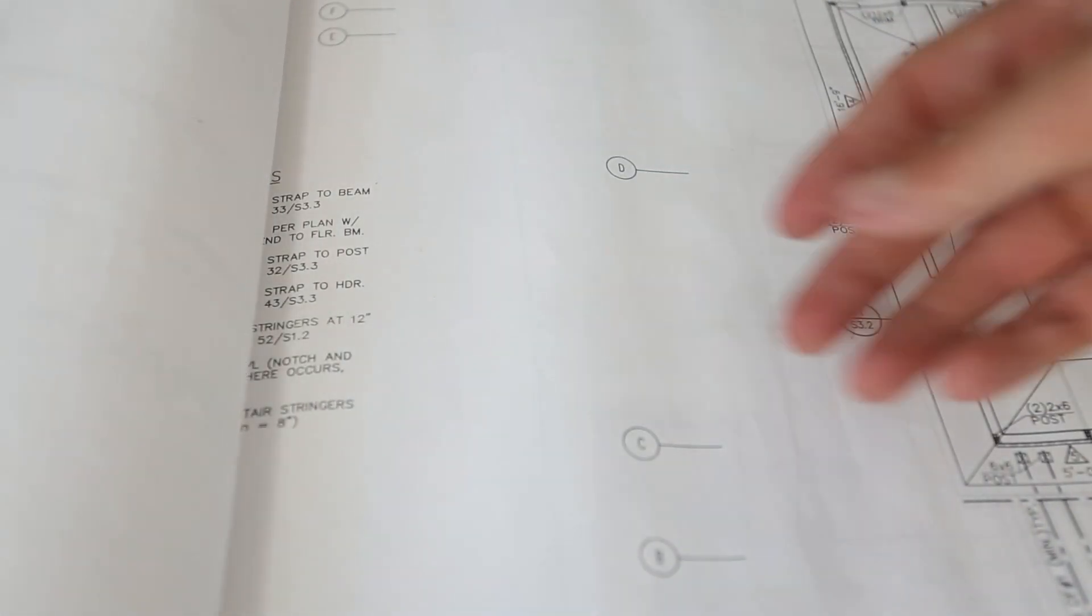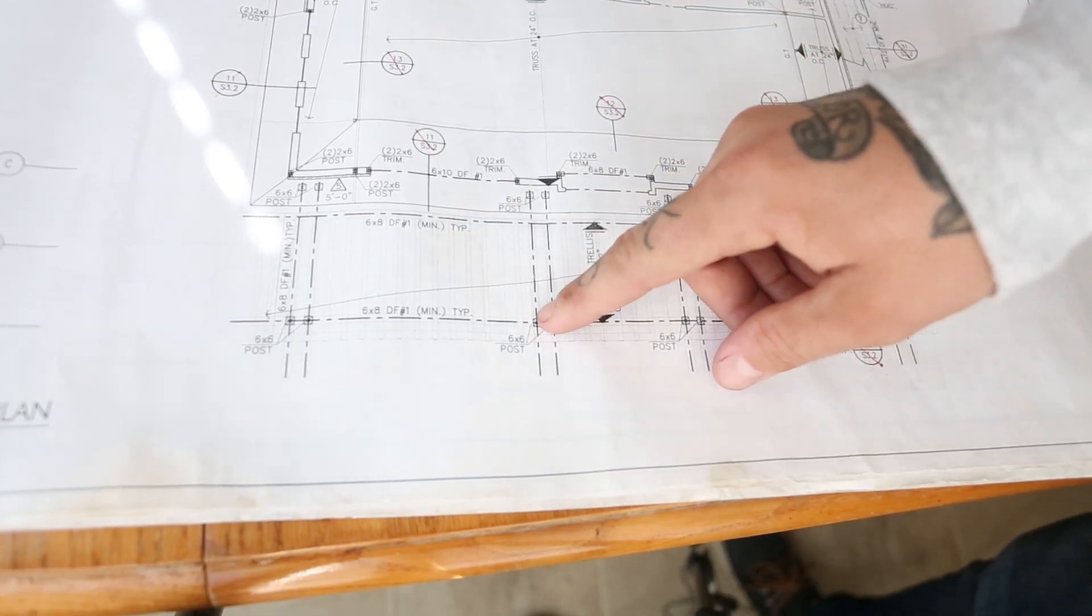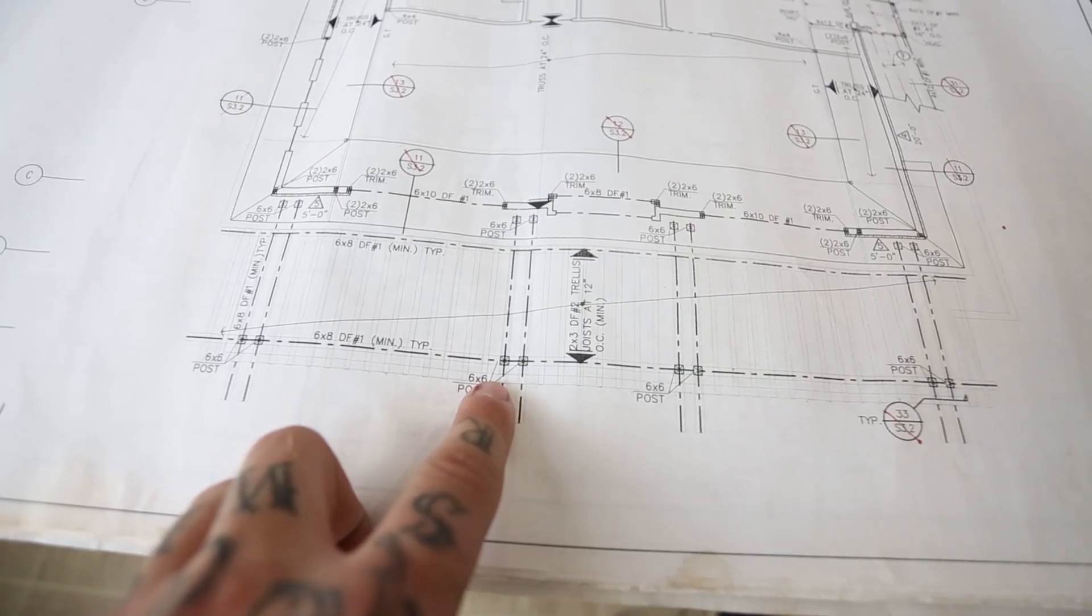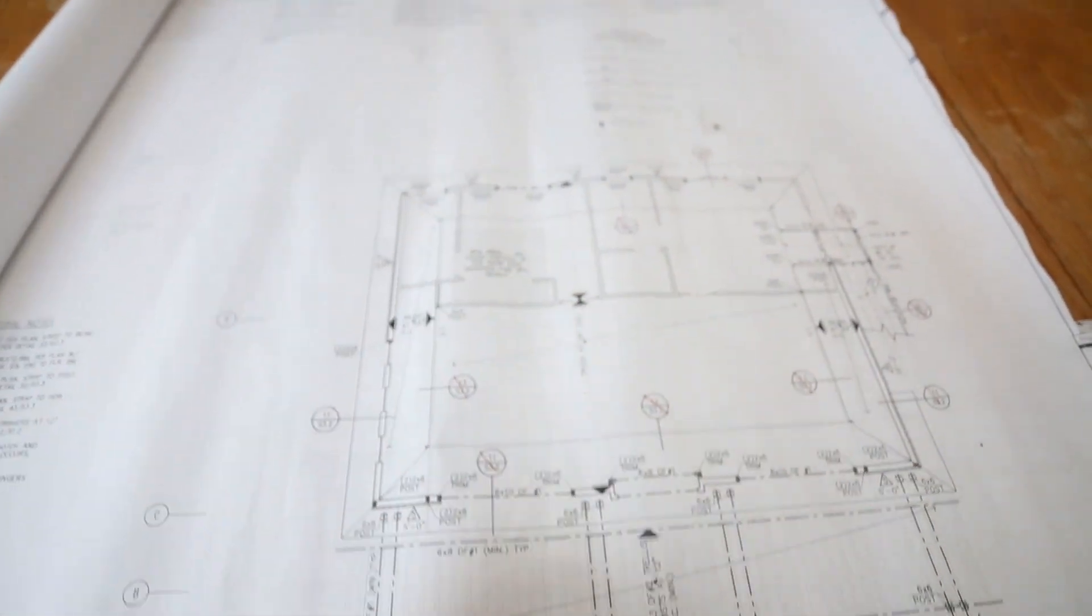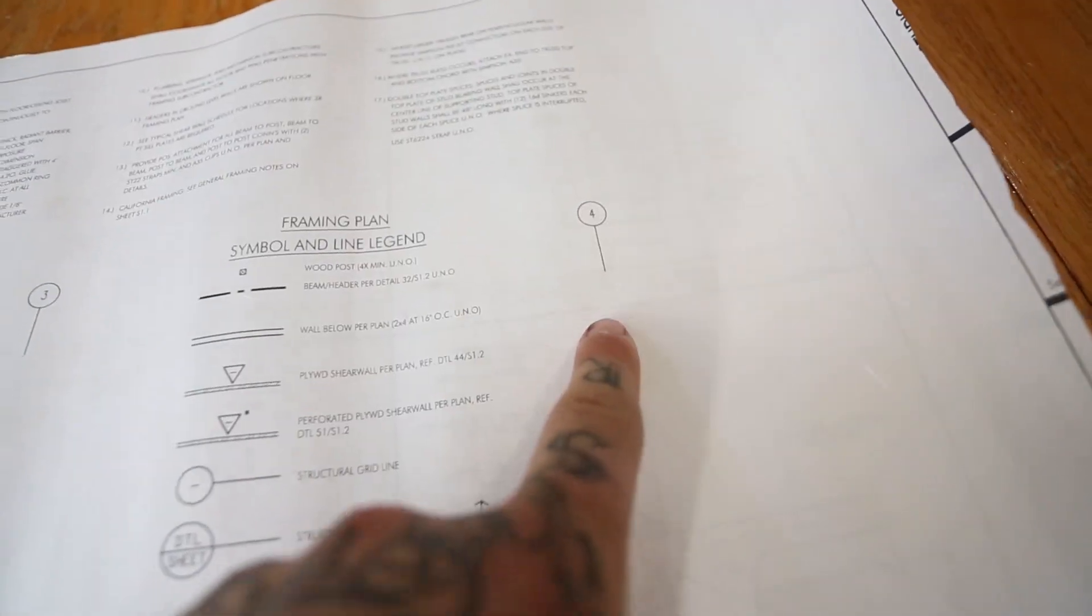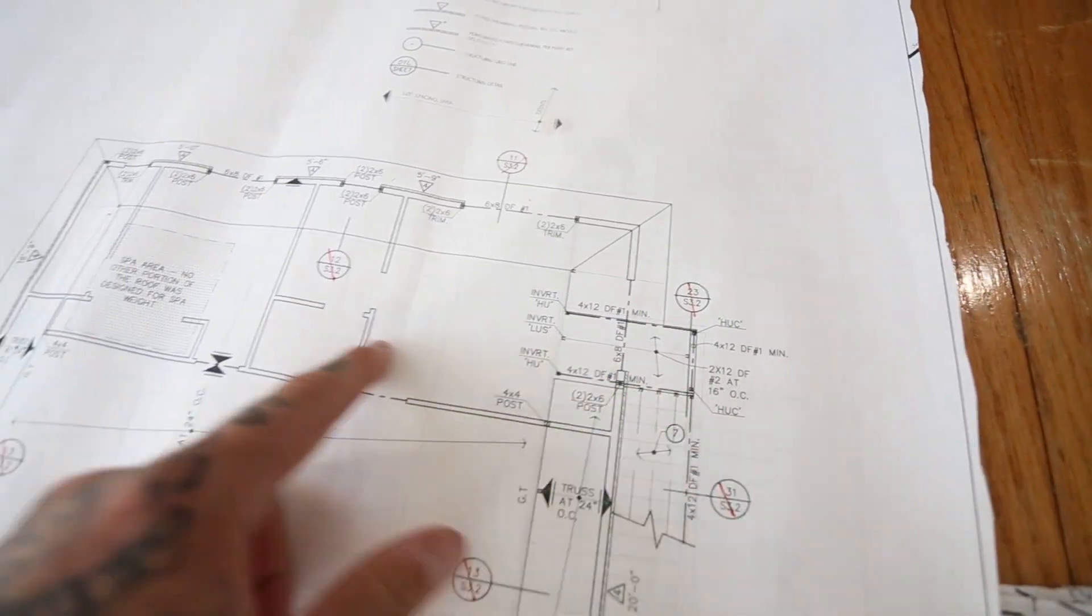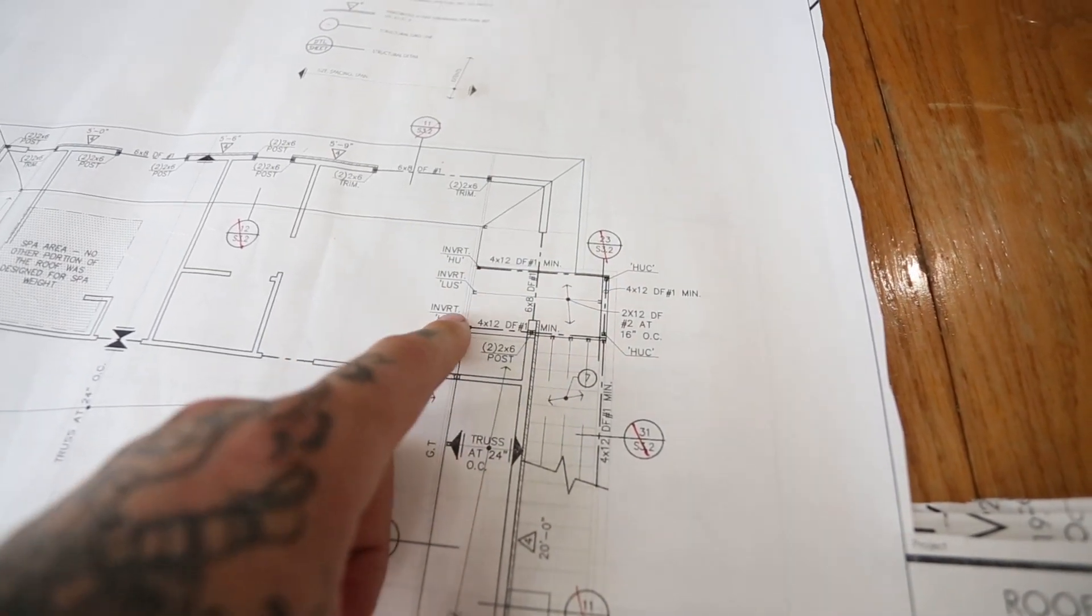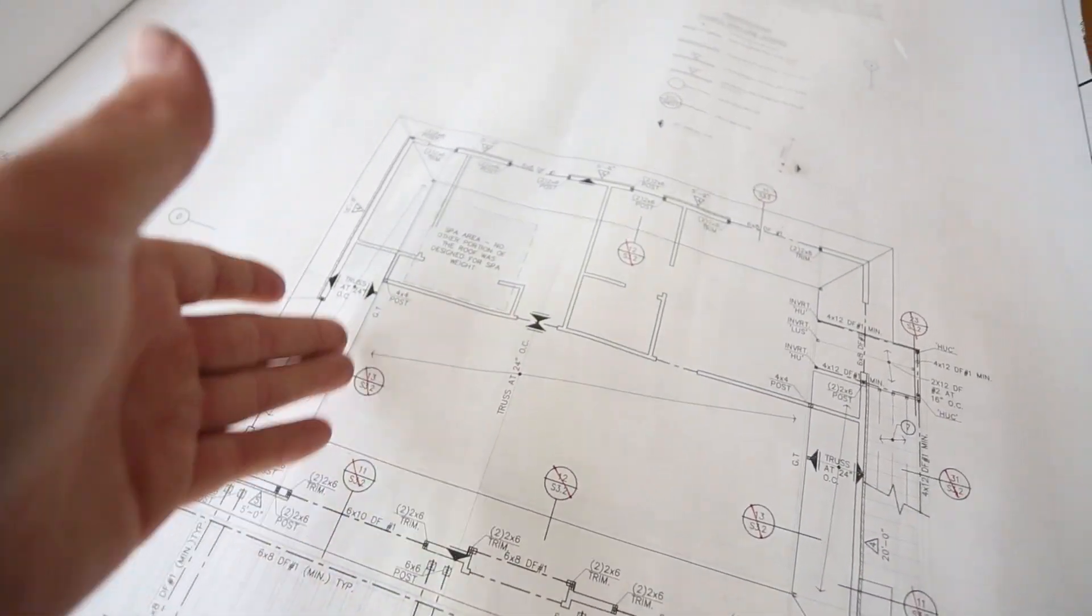We're going to talk about grid lines. These here are grid lines. A, B, C, D, and they run all the way up the building. Now let's just make up a reason here. Let's say these six by six posts didn't work out for some reason. Why? I have no idea. But they didn't. So we've got grid line A that comes across over to our six by six posts that we're having trouble with. We've got grid line three up here that comes down pretty dang close. So you can reference grid lines A and three to pinpoint a location as to where you're having trouble. From there they can get down to here and say okay yeah this is what you need to do in order to fix that. You have grid lines on every single project you do everywhere. They are on every set of plans and you can use those to reference a certain location. Say you had trouble with this staircase out here. D comes across. Four comes down. You could say hey this four by twelve Doug fir isn't working out here. Is there anything we can do to fix this? And from there he knows that you're referencing the staircase coming up to the third story rather than the staircase that's on the first to second floor.